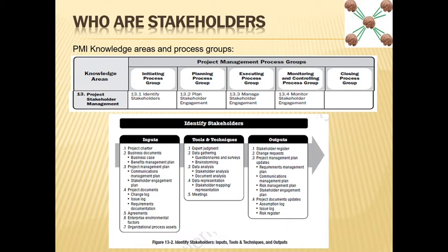And when you added him and you went to him and talked to him, he made up some new requirements, which were not exactly new, but maybe he asked that I should be added in this kind of communication. So based on his requirement, you will need to update the communication plan.